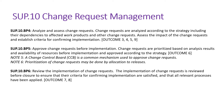BP5 talks about approving change requests before implementation. Change requests are prioritized based on analysis results and availability of resources before implementation, and approved according to the strategy. The change control board is a common mechanism used to approve change requests. When the change control board approves a change request, they decide when exactly it will be released to the customer, and based on that, the change request is prioritized.